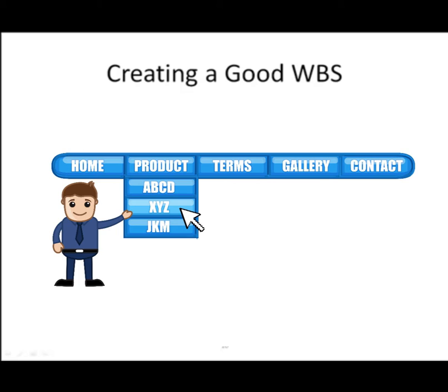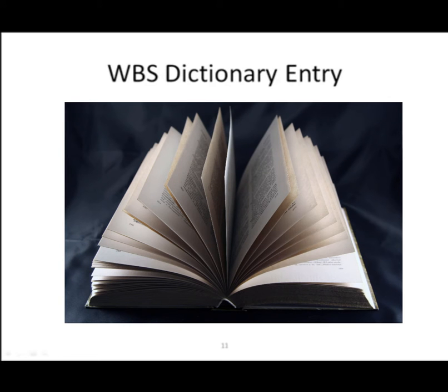Sometimes people confuse tasks on a work breakdown structure with specifications, or think it must reflect a sequential list of steps. That's not it at all. You're actually defining areas of work in a hierarchical tree. If you wanted to get the very specifics of each one of the tasks, you would use what's called a work breakdown structure dictionary with different entries. This is simply a document that describes each work breakdown structure task in detail.